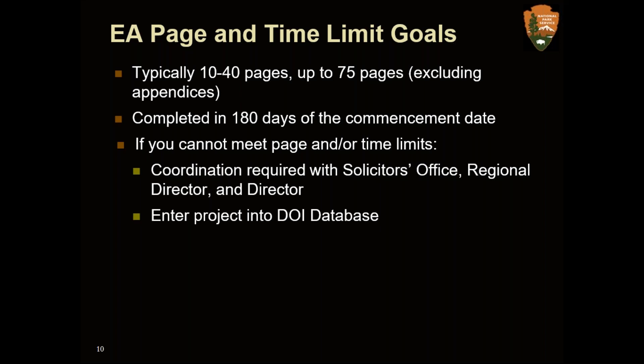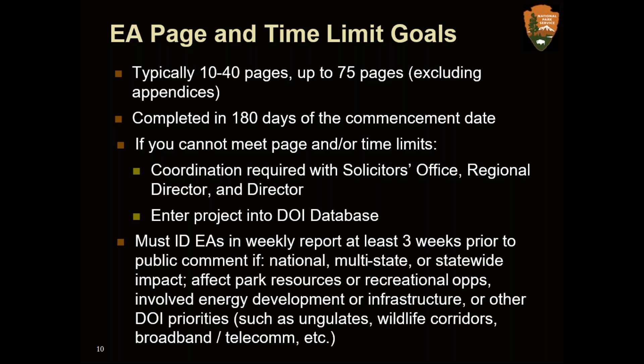If you can't meet the page or time limits, you must enter the project into the DOI NEPA database for official departmental-level tracking. Additionally, guidance from March 2019 states that even if you're meeting page and time limits, you must identify your EA in the weekly report at least three weeks before public comment begins if it has national, multi-state, or statewide impact; could affect park resources or recreational opportunities; or involves energy development, infrastructure, ungulate management, wildlife corridors, broadband, or telecommunications.